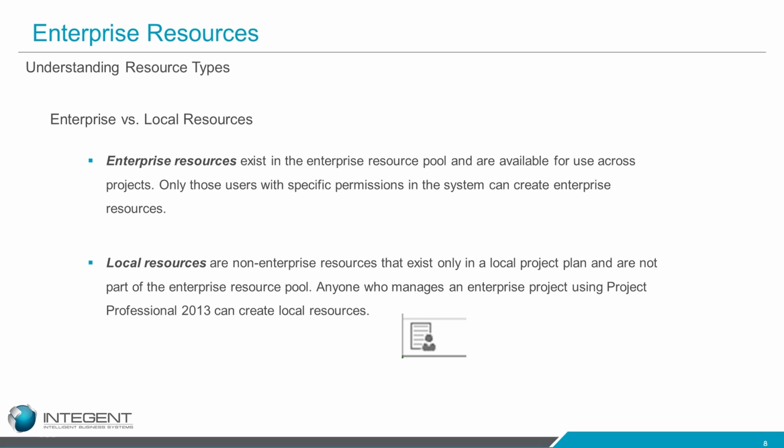Well, if you create a local resource and assign it to a task in your project plan, even if the restrict updates are on, you can update task progress directly in your project. So either updating % complete for that task that they're working on, or going to maybe a usage view and putting in the actual hours that the resource has spent on those particular tasks.